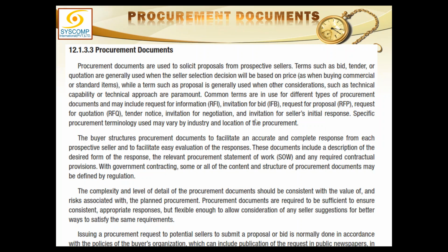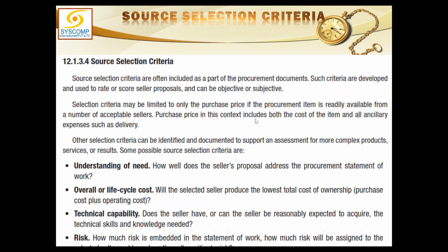So this all is based on the statement of work. Then the source selection criteria: how would you grade the various bidders from a technical as well as financial point of view? How many points are you giving for the understanding of the need? How well has the bidder understood our requirement?